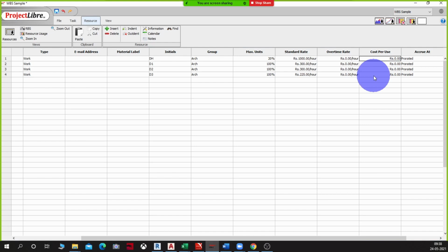Or if you're calling in a consultant, right? Let's assume that the head of design whom we have here, whenever they are coming from a different location, you need to take care of their travel arrangement and their accommodation. So that's an overhead cost, right, which is not directly billed in the project right now. So those kind of scenarios can come here. So let's assume that the design head is not from our place and he comes from somewhere else to deal with this project. So the 20% that they are giving to this project, every time we incur a bill for them, let's assume that we end up spending 4,000 rupees for that person.